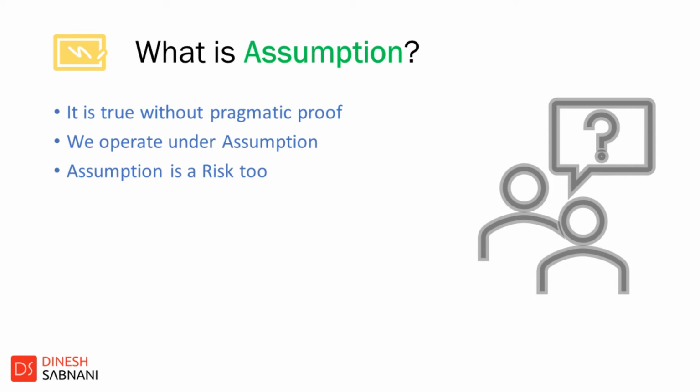What's important is that we regularly review whether the assumptions made are still holding true, and if they don't, then we react and make necessary changes in the plan and execute it thoroughly. It is also important to note that every project assumption is a potential risk too. Know how to recognize such assumptions and have controls in place to ensure that if any assumption turns out to be erroneous, the impact on the project execution is minimal.